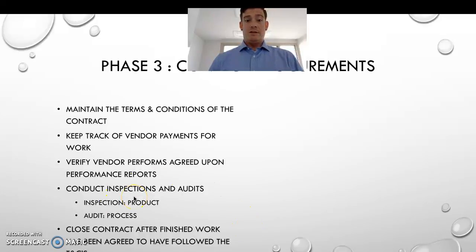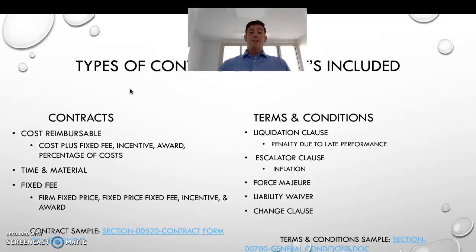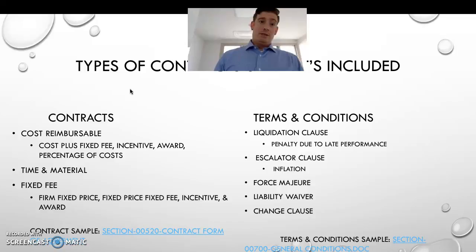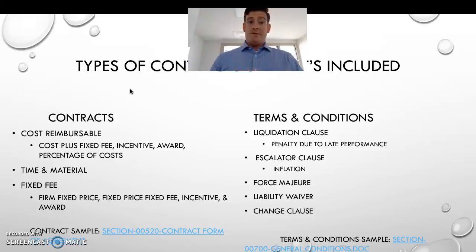There are many different types of contracts - the main one most people go with is fixed fee. Out of all contracts there are three overall types: cost reimbursable, time and material, and fixed fee. Time and material is the best of both worlds - a little bit of fixed fee and cost reimbursable. Types of cost reimbursables include cost plus fixed fee, with incentives and awards, and percentage of costs. Fixed fees include firm fixed price and fixed price with incentives and awards.